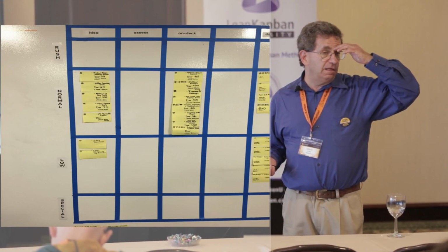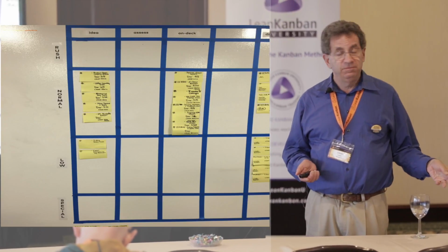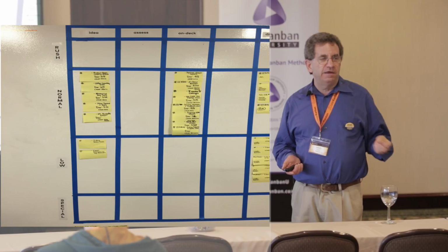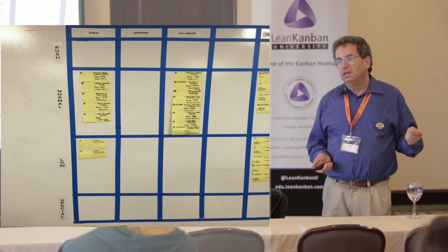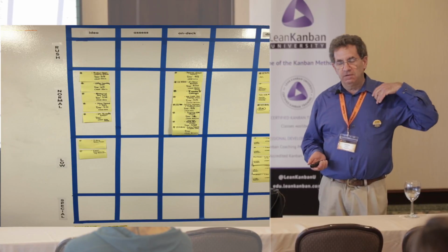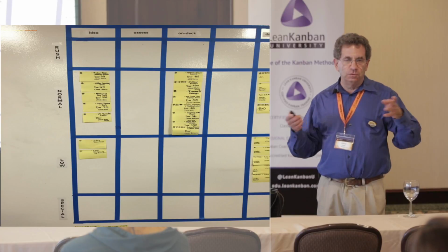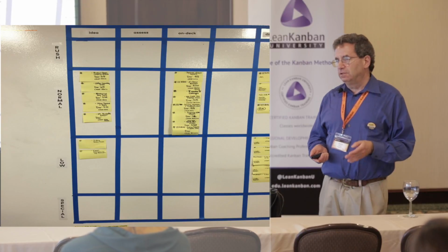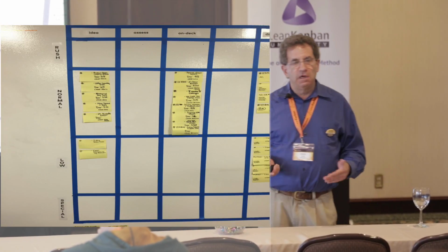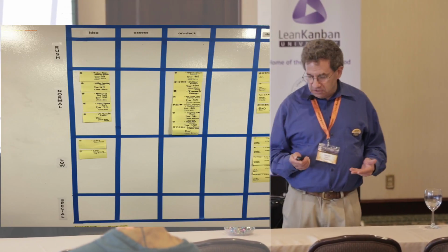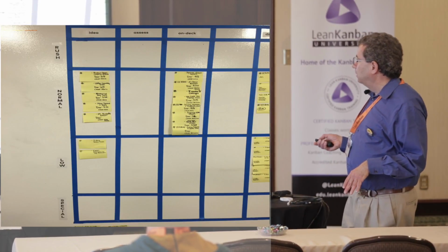anything that was requested in 3 weeks or less automatically became a rush, because a lot of what we do in this business is fixed date delivery. It's mainly at holiday season we go crazy, and holidays come and holidays go. We have an annual sale that comes and goes on a particular date. We have a Mother's Day sale. We can't redefine Mother's Day. So we do a lot of stuff that's driven by the calendar, that's fixed date. And when you have long lead times, you end up with an awful lot of stuff going through rush.